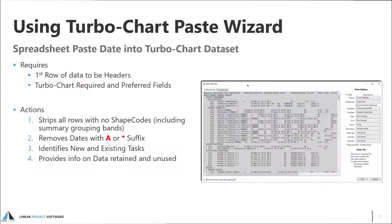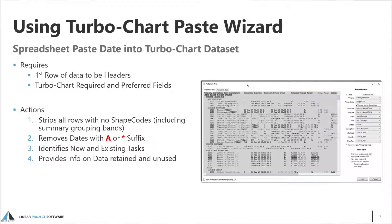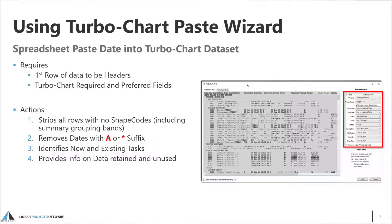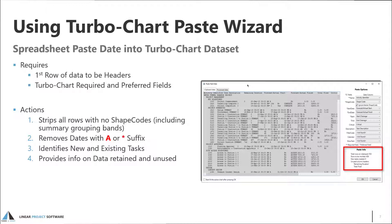To paste data using the Paste Wizard, select Data Tasks from the TurboChart menu and click on Paste Wizard. The first tab displayed shows the data contained in the clipboard ready for processing by the wizard. Data needs to be in tabular data format with the first row containing column headers. The Paste Wizard options lets you map the fields in the clipboard data to those required by TurboChart, indicating the required and preferred fields. The Paste info provides a summary of the wizard's processing operations.